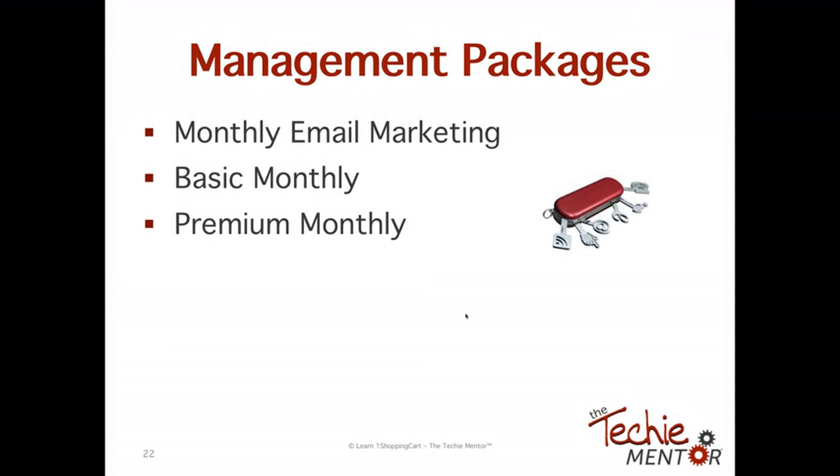One is auditing. The second one is actually coming back and saying, okay, here's the proposal, if you will, that says here's what I propose and here's how much it's going to cost, and this is when I can get it done. And what that allows them to do is see it and budget and say, well, I can't do it right now, but I could do it in the future, right? So my point is that the audit package isn't to discover the issue and fix it. It's only to discover the issue and tell them how you can fix it. So there's really 2 projects in there, okay?